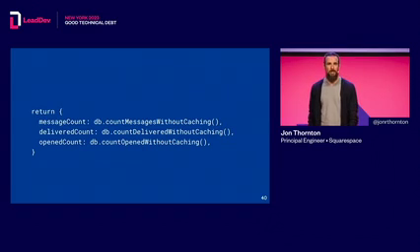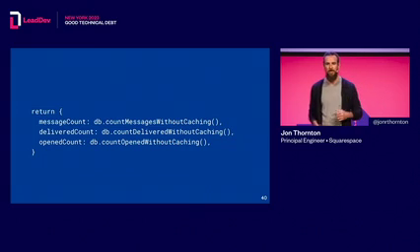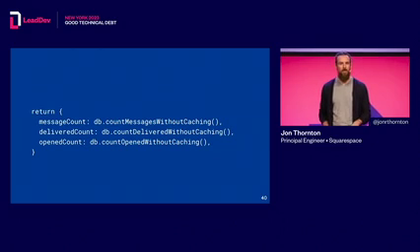So we decided to make a relatively small bet by implementing the first idea that came to us in the simplest way possible. Now, it's not worth going into the technical details, but what we built here was very simple and very inefficient with the database. And no one on our team expected this to scale for the millions of users that we were building for. But it worked perfectly fine for hundreds of users, and that was good enough to unblock us for a beta launch.